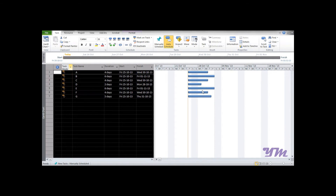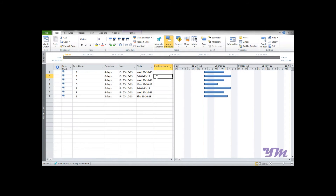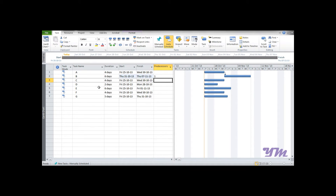Now that tasks are auto-scheduled, all activities cannot start simultaneously — they may have relationships with one another. To enter a relationship, suppose Activity B starts after Activity A. You would add Activity A as a predecessor of B. You cannot write the activity name directly; you must enter the ID number. Activity A has ID number 1, so you write 1 in the predecessors column for B.